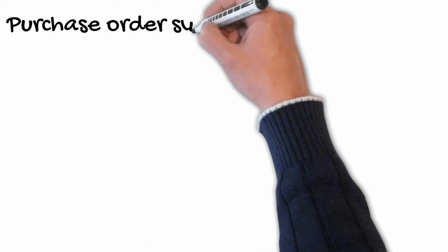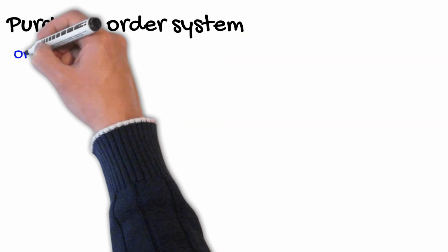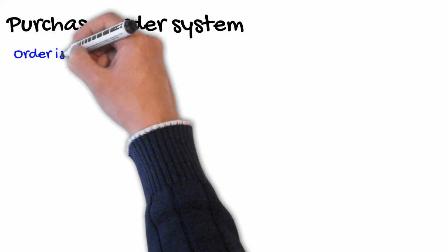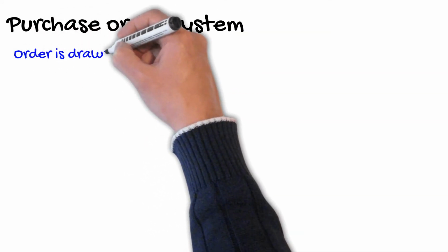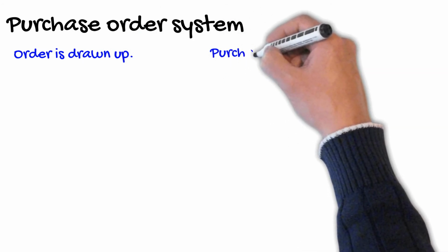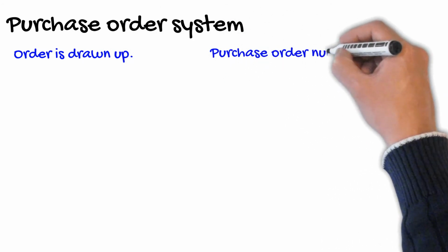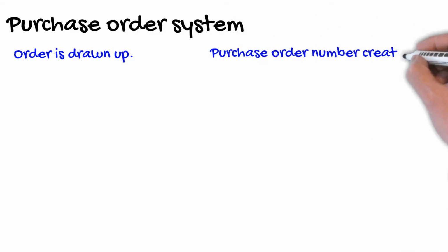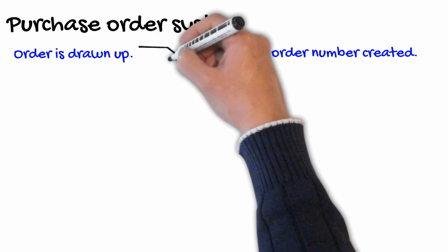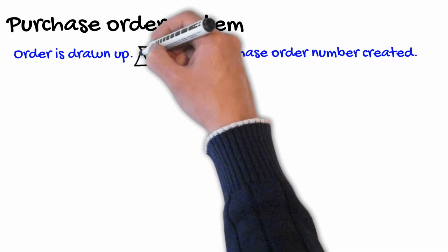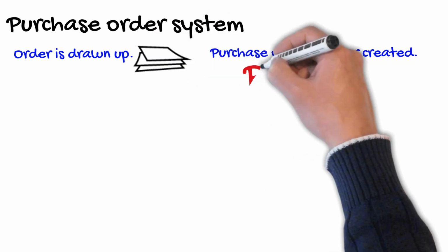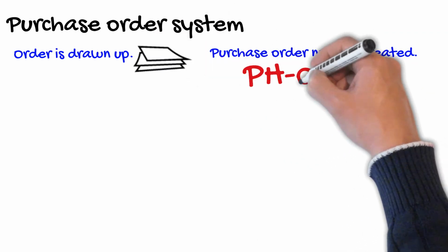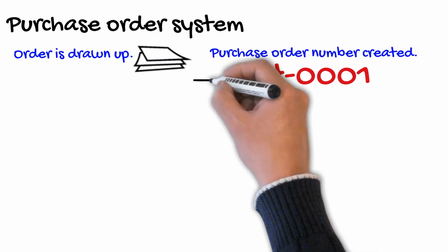Once the price has been agreed, orders need to be placed. So the principal contractor will start drawing up orders. They'll raise a purchase order number against each one. This is a way of tracking their separate orders. We need to make sure that it's not the same person raising the orders and then paying the orders at the end of the day. Otherwise, people might be just ordering things off of friends and getting inflated prices.